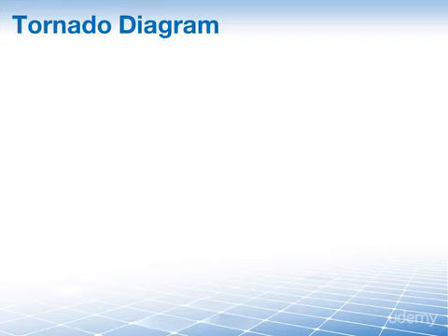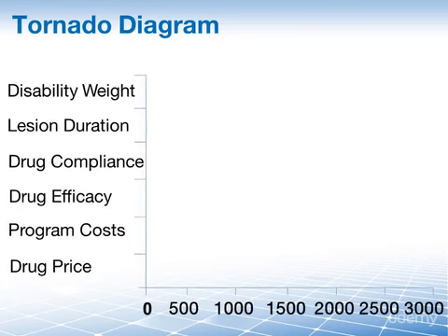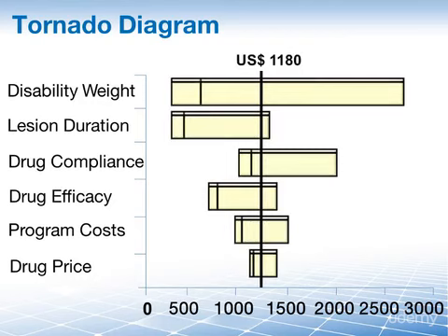Our next tool and technique is the sensitivity analysis, and what you see building up here on the screen is a tornado diagram, which is pretty much the standard way of displaying the results of the sensitivity analysis. The idea behind the tornado diagram is examining the variables that have the most potential to inflict an outcome. Some variables have a greater effect and some have a smaller effect on the outcome. The tornado diagram shows these in a descending form, presenting a quick, visible way to delineate the results.